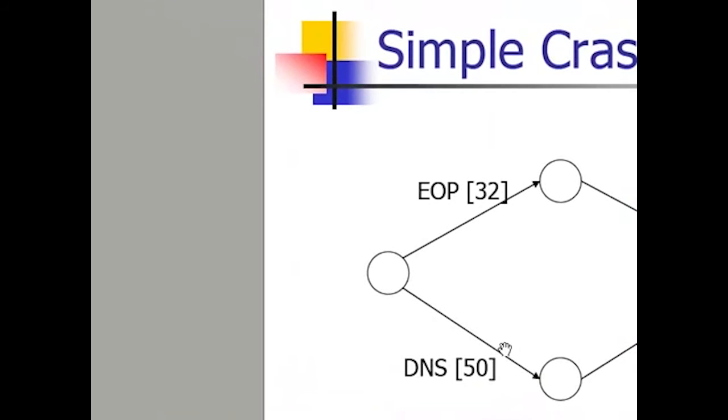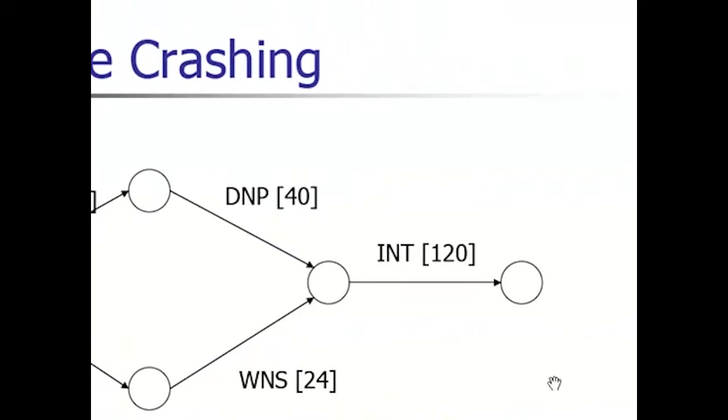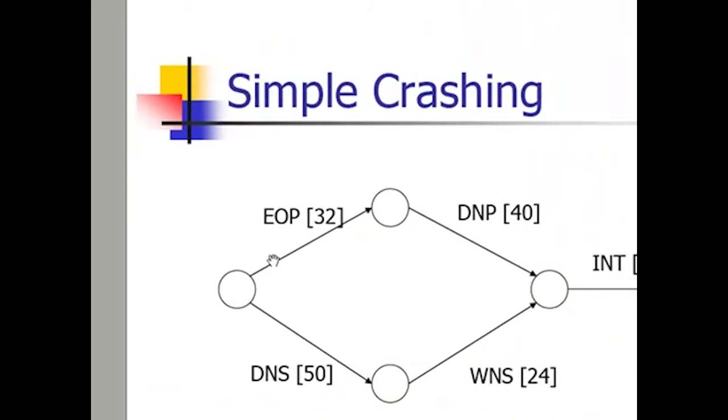On this one, still on the same path. We know that right now we have 2 critical paths. So if we do not consider INT activity, you need to reduce this bottom part by 1 more hour. Also, at the same time, reduce the top part by 1 more hour. Only in that way can we reduce the whole project by 1 hour.